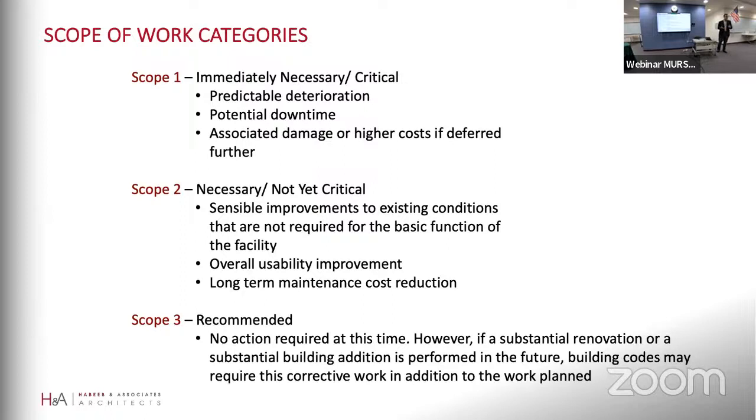So in the Commonwealth, we have a regulation that says if you spend a certain amount of money in your facility, you're obligated to bring that facility up to the current regulations for handicapped accessibility. The other item that might fall under this category too is fire sprinklers. So we have a mandatory fire sprinkler law here in Massachusetts. Some of our older buildings were built without them. NISCO is one of them. And again, if we were to undertake a substantial renovation of a school like NISCO, we would be obligated to install sprinklers.